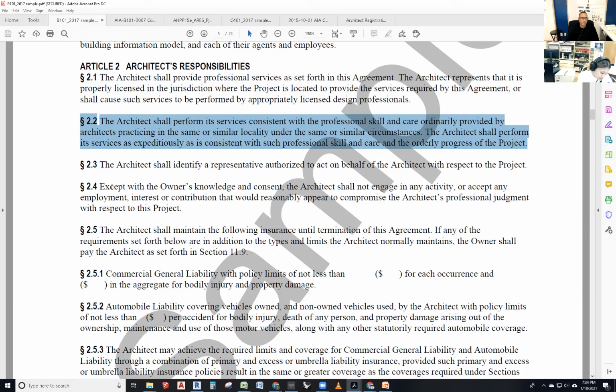Well, here at Flow, we don't use it. We just call it permit set or construction set. We don't say it's 100%. The reason is people sometimes get paid on percentages of finalizing a project. So they're 50% schematic design, 100% schematic design, and then they issue a payment. My jobs are not in the $1 million range of architecture services and design fees, so we're not worried about getting paid. We divide the payments into three or four, and we've determined what those steps are within our measuring bracket.